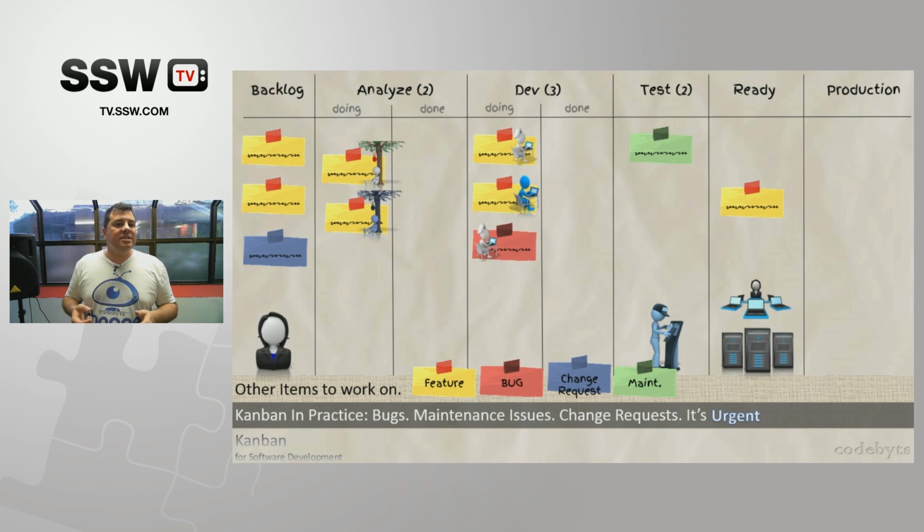Once you start working with this, you're going to get used to colors. One thing I do not suggest is using different colors for every little thing, even between sprints. It's better to standardize this, because after a while it will become second nature to you. So do not make a feature yellow if you're using Scrum in one sprint or one iteration, and purple in the next. Use the same, even between projects, because your team is kind of the same. I would ask you to standardize this.